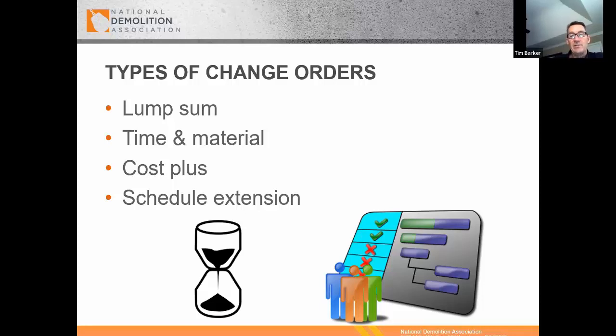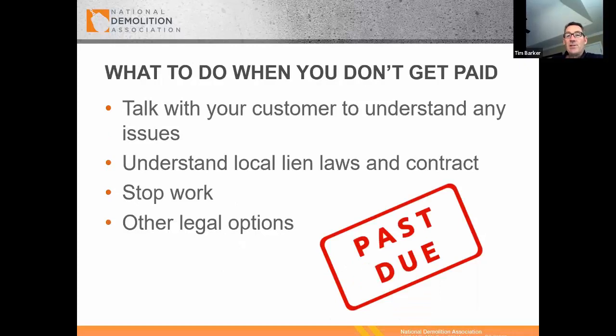And so you need to understand what the client is willing to pay you, if it's lump sum, time and material, cost plus. And these things you should really work out up front when you work out the terms of your contract. With change orders, you should also seek a schedule extension so that you get some additional time with the additional work.